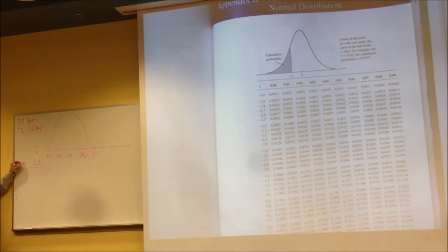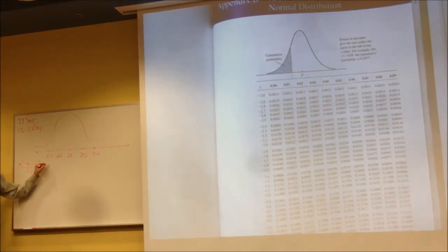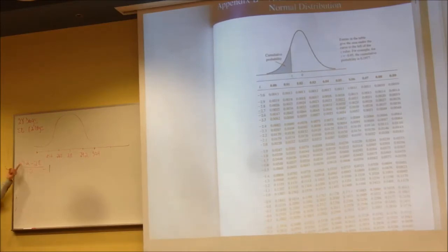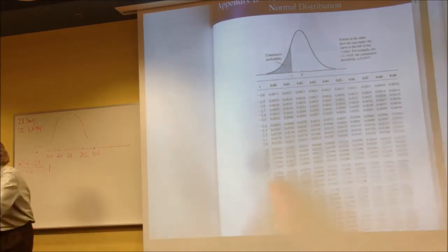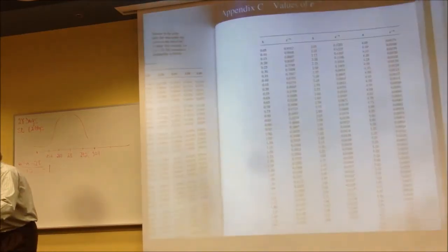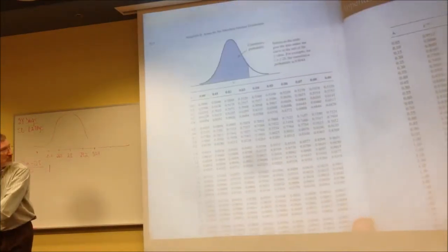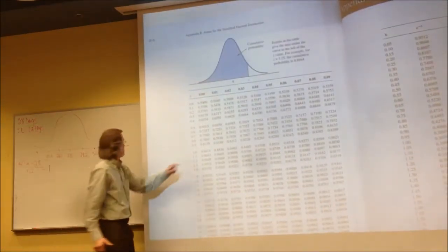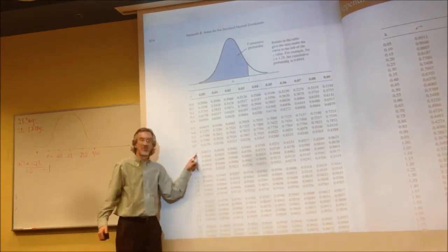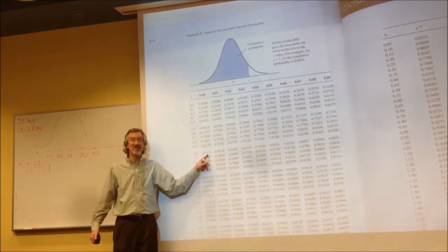Whatever you're being asked about, minus the expected number or mean, if you want to talk about any data, divided by the standard deviation. This time our answer is +1, because I picked the number purposely as exactly one standard deviation above the mean. And so we could look up +1 on the next page, right here. And this right here, 1.0, because there's no other digits to the right, and the probability is 84.13%. Well, what a coincidence.